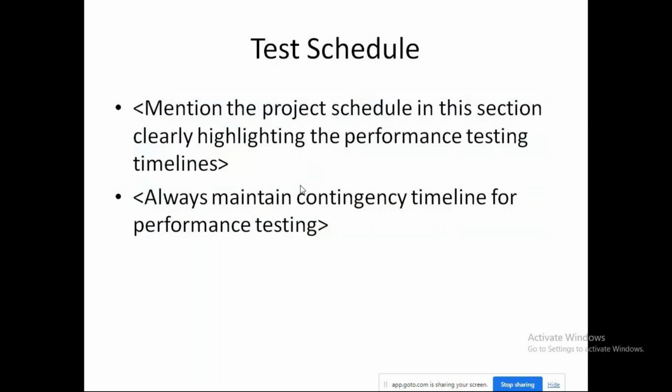You put the entire project plan over here and then you highlight the performance testing timelines. Please maintain the contingency, please maintain the buffer for your performance testing timelines, because you never know, unnecessary delay will get introduced in the project. So always keep the buffer time for your performance testing.